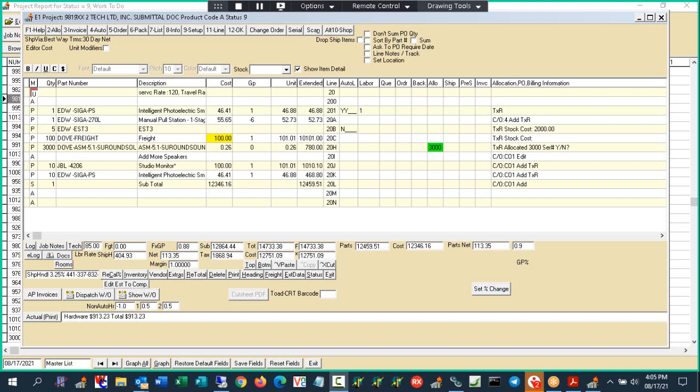So that's the point. That will stop. Once the change order module is turned on, nobody can manipulate this project without going through a change order approval process.